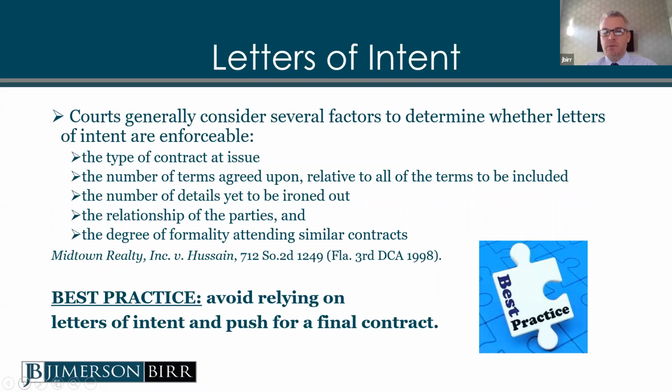Again, this goes back to whether or not you actually have an agreement. And when it comes to letters of intent, courts are going to consider several factors to determine whether they are in fact enforceable. One of the important things is the number of terms that you all agreed on. What details are in there in a particular agreement between two parties in their business? Are all of those key terms that you usually see in an agreement spelled out in the letter of intent? If they're not, and a court determines that those are essential terms and there was no meeting of the minds, then the court isn't going to find that the letter of intent is a binding document.